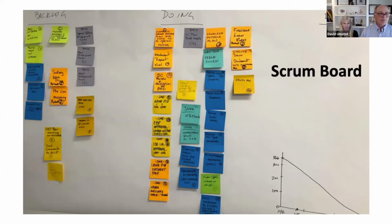Yeah, I think you're absolutely right. So we see the same thing in construction. Electricians tend to be the worst offenders. I don't know if we've got any electricians on the line tonight, but with long duration tasks, any task that is more than 10 days in a Last Planner or phase pull can be broken into smaller tasks, either by zone or by specific activity. They may not want to do that, but it will help plan the work, and it will also help get better production, more reliable, predictable workflow.